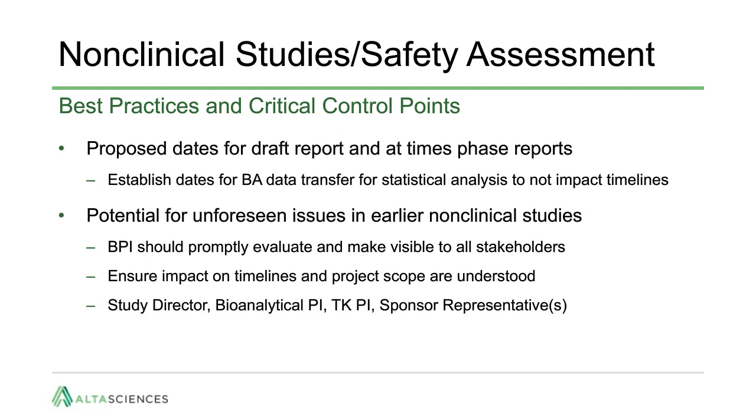Non-clinical protocols often include proposed dates for animal arrival, dosing dates, draft reports, and final reports. Proposed dates for different phase reports are included, or it is indicated that the dates will be added by amendment. A critical step in the timeline is often the transfer of bioanalytical data to another PI for statistical analysis. This transfer date must be determined and agreed upon to ensure the project progression timeline.